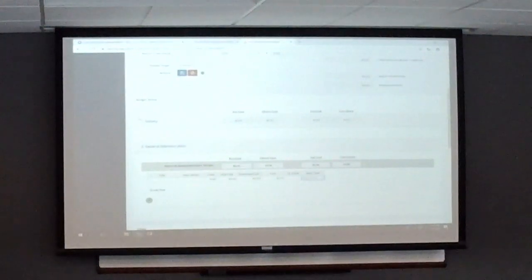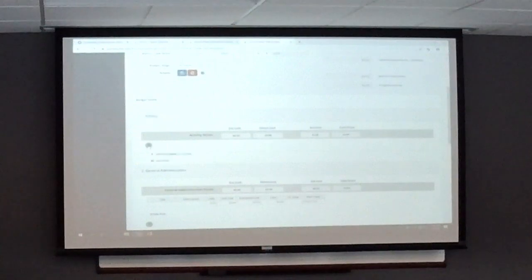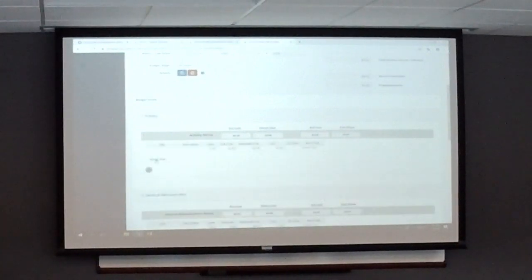For your budget though, so you click on your budget for your activity. You click down, you add table, add a row, put a title in, put a description in. You can do the unit cost. eCivis did a whole training on this, or you can just put the cost of the item in. You can put the GL code that if you have a code tracking for that. So for instance, it's a consultant with a PO number or with some other account number. If you've got an internal tracking number, go ahead and put that there. And then, everything is direct cost. If you want to do something indirect cost, let's have a conversation.